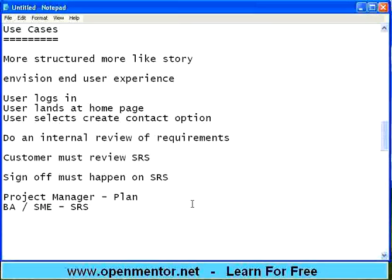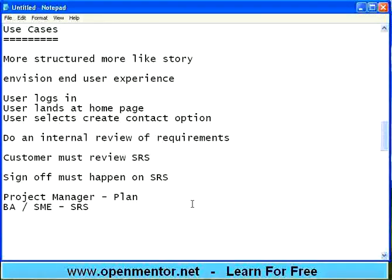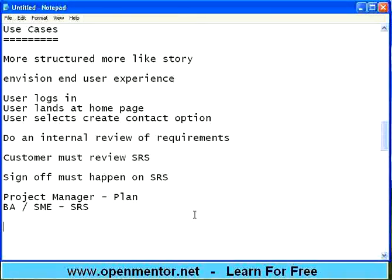If requirements are not collected correctly, documented correctly, or reviewed correctly, then the downstream processes will definitely have a problem. For example, in real estate — you ask for a three-bedroom house and your builder gives you a three-storied house and asks for more money. It is not going to help you. So if the requirements are gathered wrong, the project will go wrong. This is another key aspect of the project.